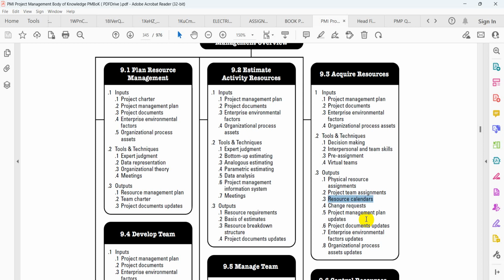When we come to the human resource calendar, it is when you allocate people on specific dates when they are available. Because you might have other duties you are performing while the project is running. So when they need you is when you are going to appear. Maybe Mrs. Piri is needed from 9 to 20 July. The other dates she's busy. So you can't allocate me on other dates. Look at the calendar according to how it was planned.